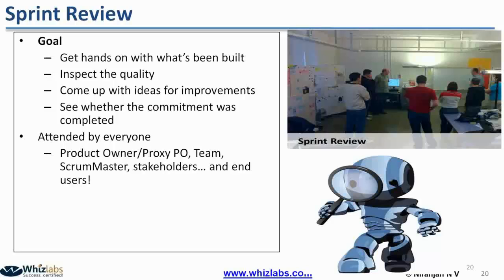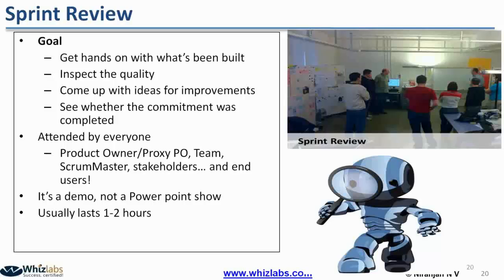So who are the participants of this meeting? Here you can call each and every stakeholder, whereas for the daily Scrum meeting you don't need to. This is a very important meeting where the stakeholders' views are also important. The Scrum team and product owner have to be there, plus the relevant stakeholders who are going to give feedback about the sprint review. And it is going to be a real demonstration, not a static prototype or a PowerPoint show. It is real, complete working software.